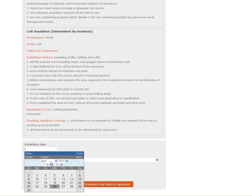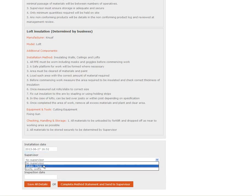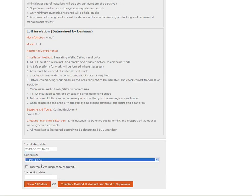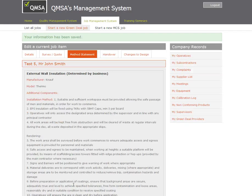What you need to do at this point is select when the measure will be installed. I'm saying the 27th. I'm going to be the supervisor. There's no intermediate inspection required. The provider has not asked me to do that and I'm not doing one myself. Then I click to complete method statement and send to supervisor.